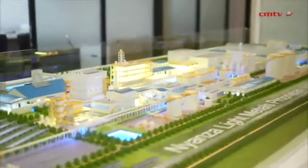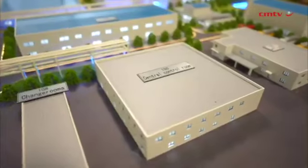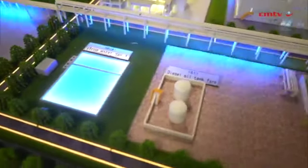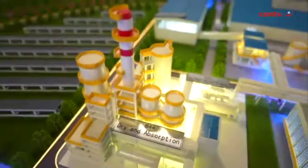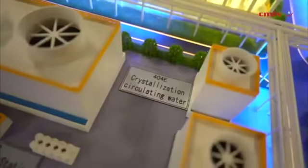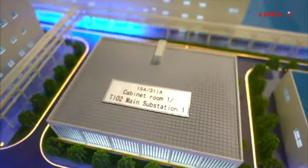If you look at the project CapEx itself, it's about $550 million, just the CapEx alone. But then when you bring in the financing cost, because the construction period runs over 42 months, so 36 months to mechanical completion and another 6 months for commissioning and ramp-up, private equity is not capable of taking such long periods of no cash flows. The local commercial banks struggle with beyond a 7-year tenor. So we had to do some fancy structuring to be able to bring in the multilaterals.